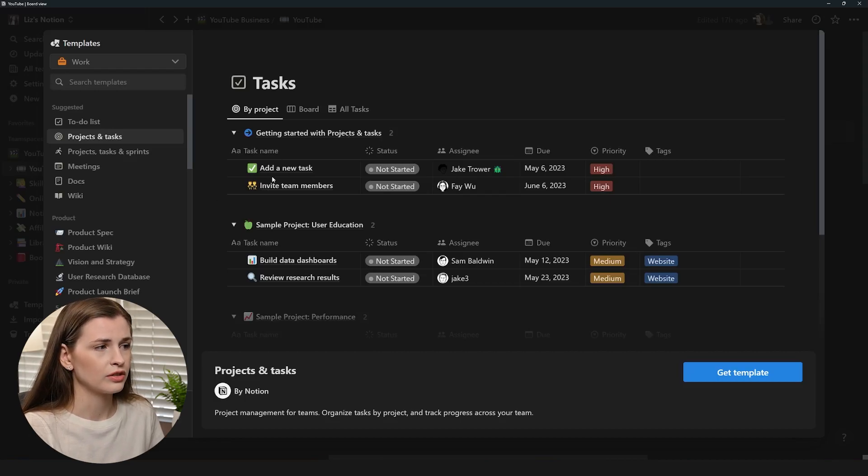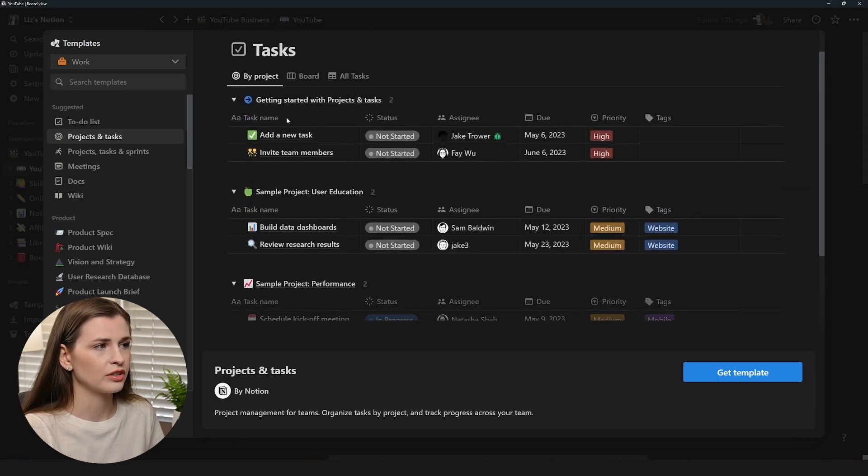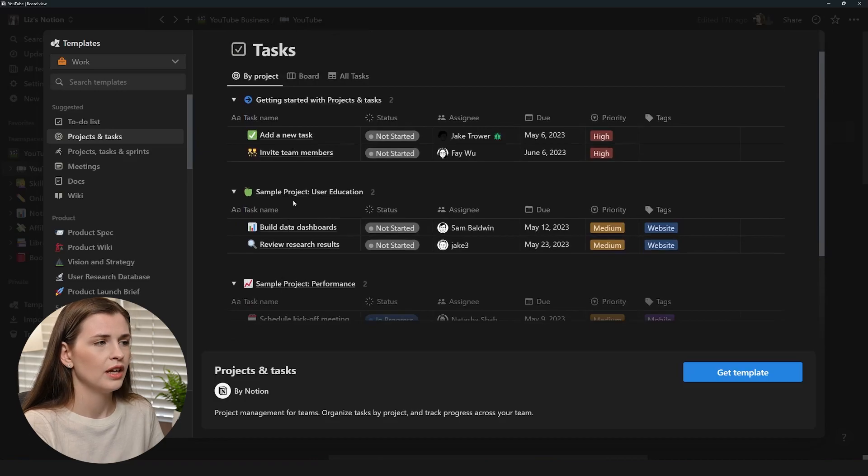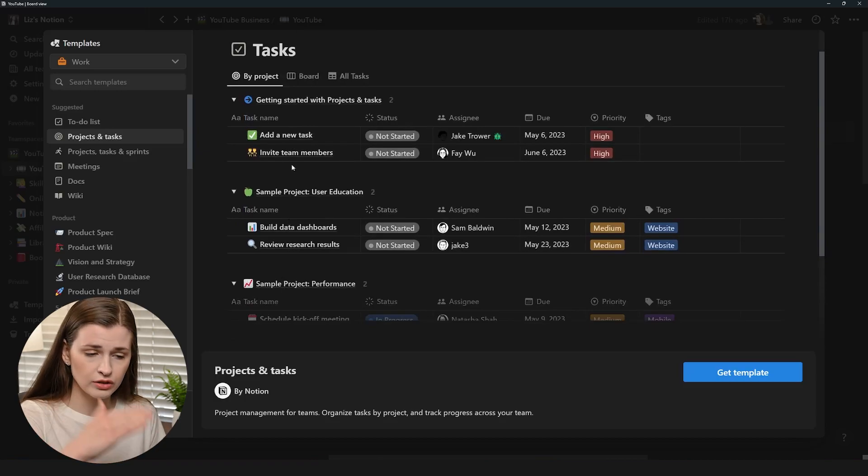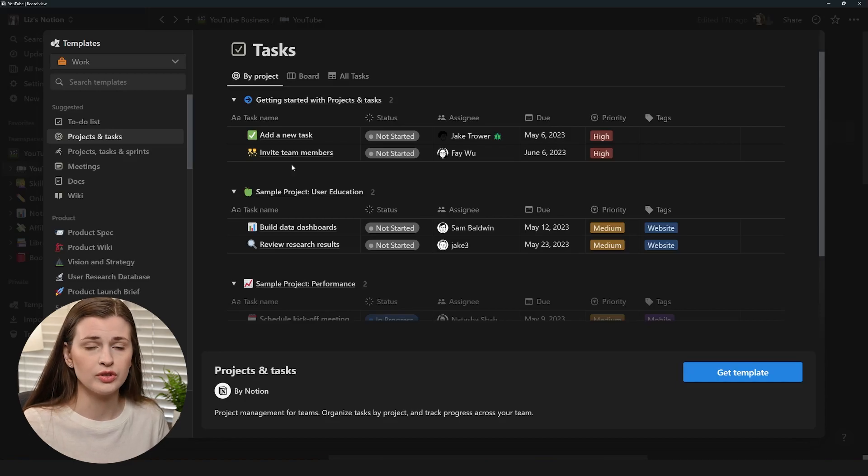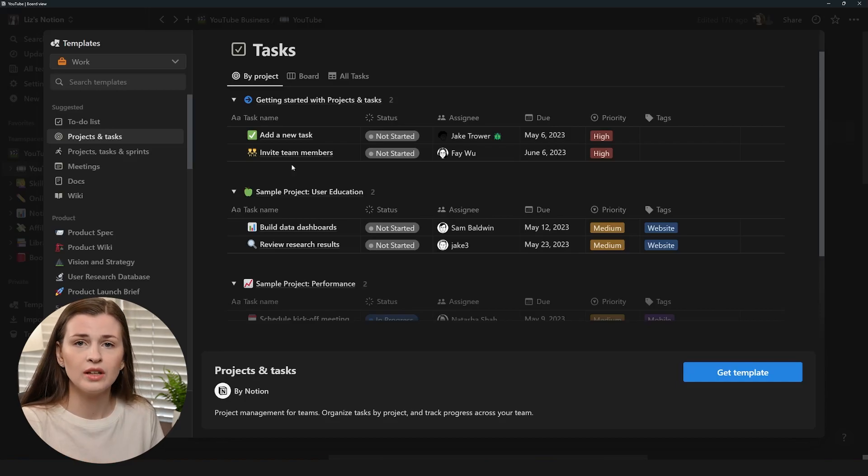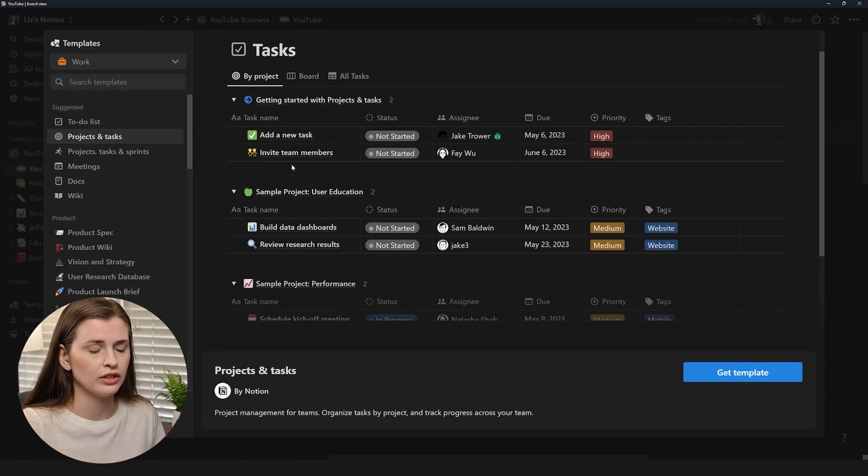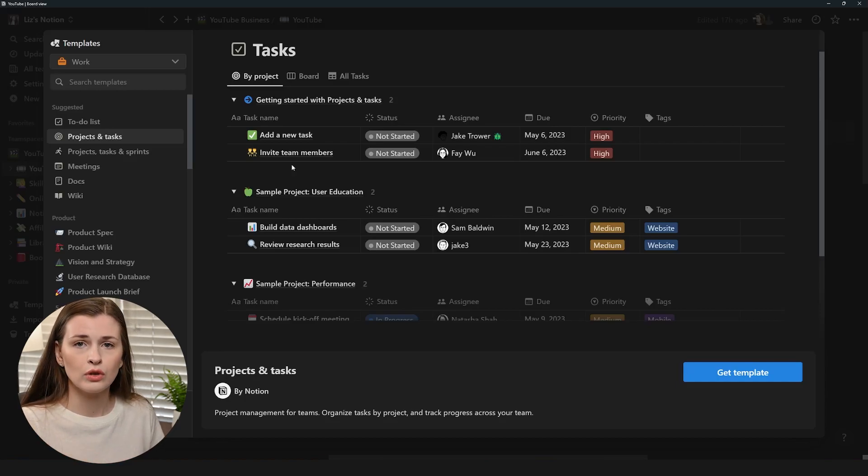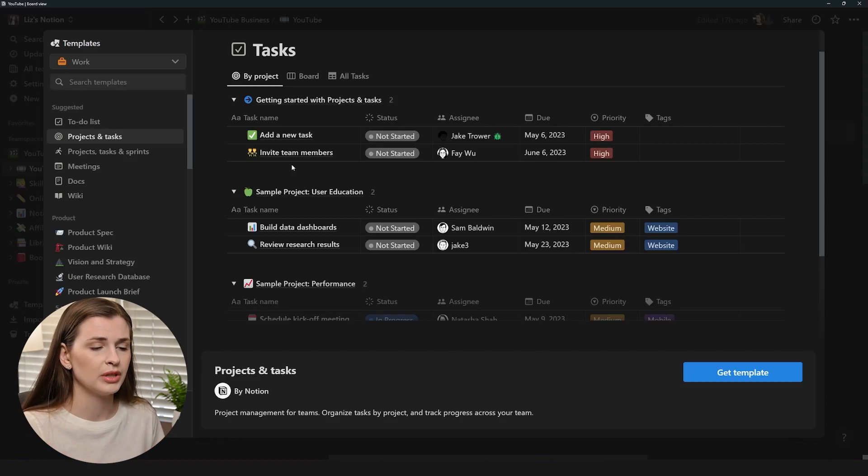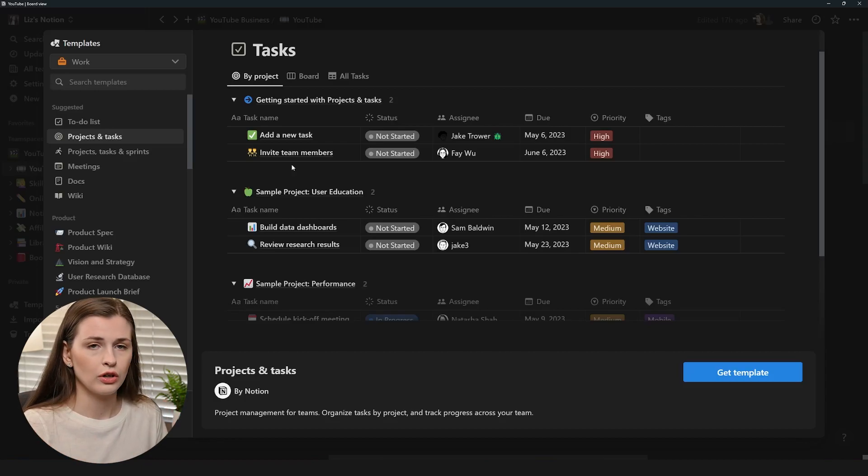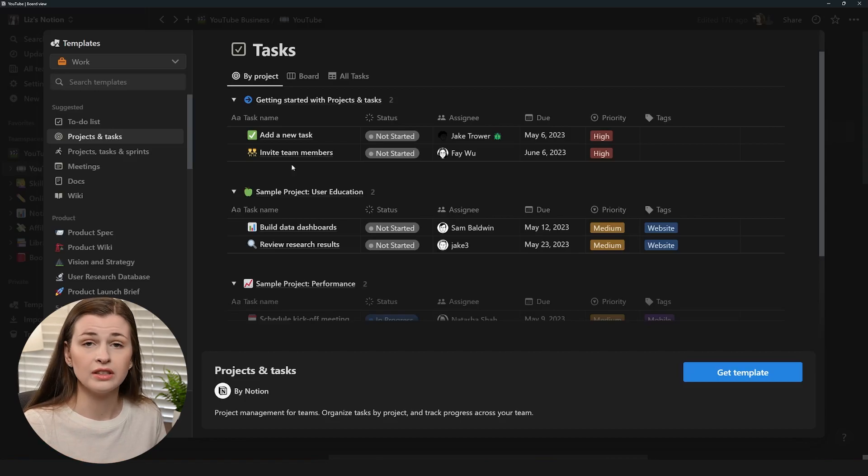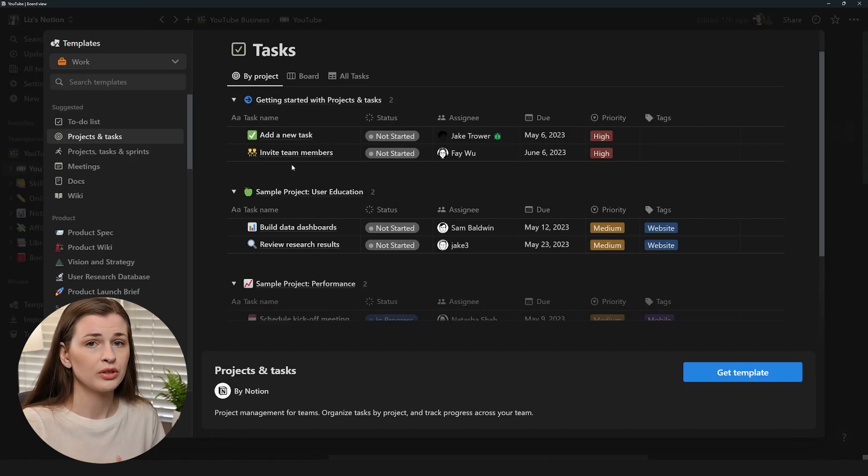And you as a product manager would come up with these tasks. So you would say look, there's three different projects: one, two, and three. And you are to add the task there. So you decide these are the features that I want you to build. And then you make subtasks, and then you assign it to your engineers. And your scrum master or somebody or your project manager is in charge of making sure that they actually complete the tasks. But you have to build the backlog.